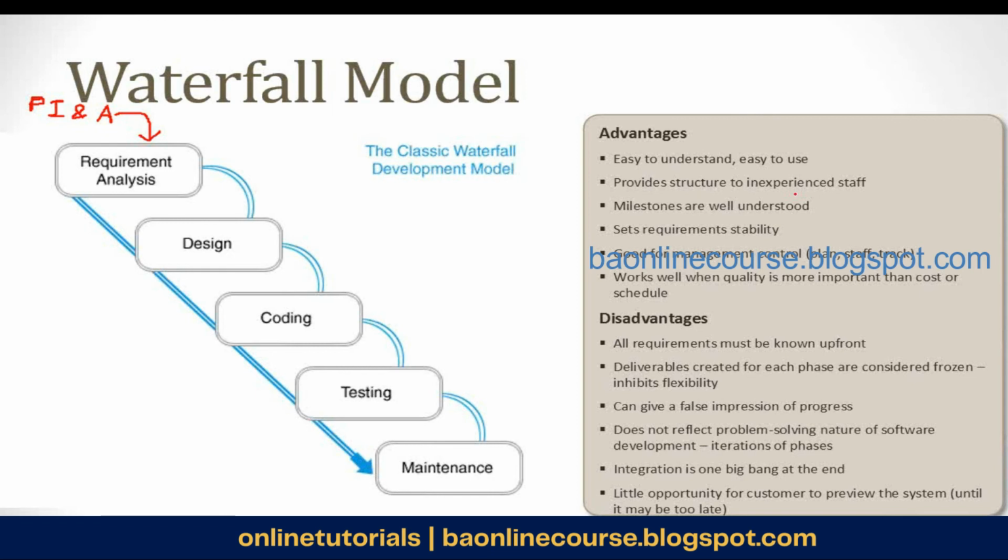Now when do you use this? When the project requirements are clear, you feel that the requirements might not change so much, and the project timelines are also smaller, around 6 months or less, you tend to execute them in a waterfall model. This is the best model because it's the simplest way: doing one activity after the other. All your requirements are stable and clear, so there is no chance of requirements changing. So you don't really need to worry about it. So you execute this in a waterfall model.